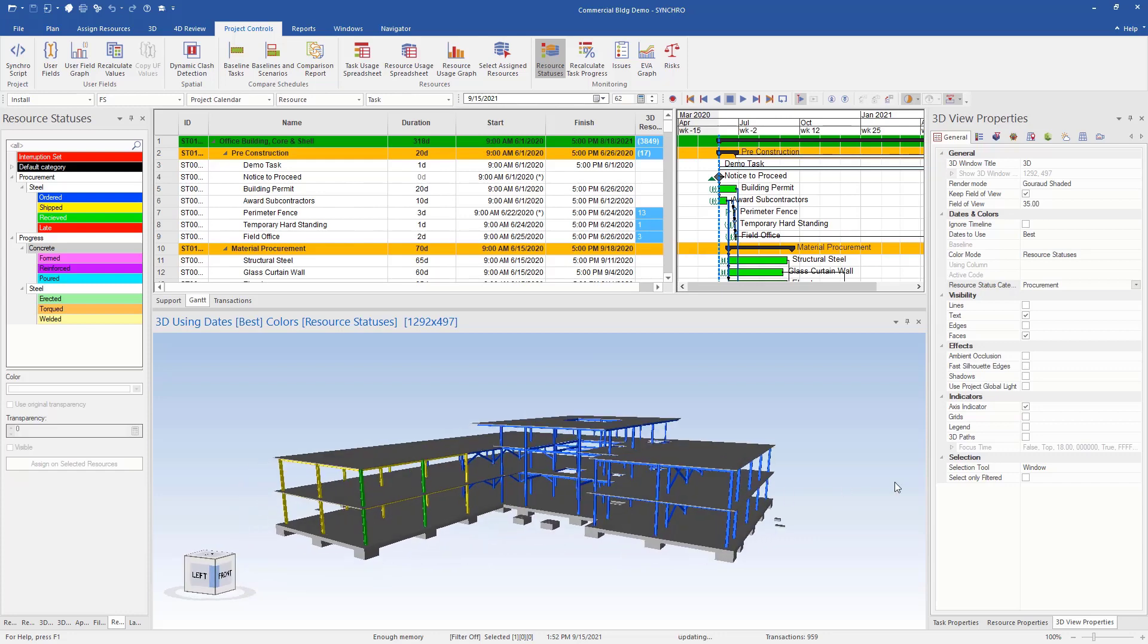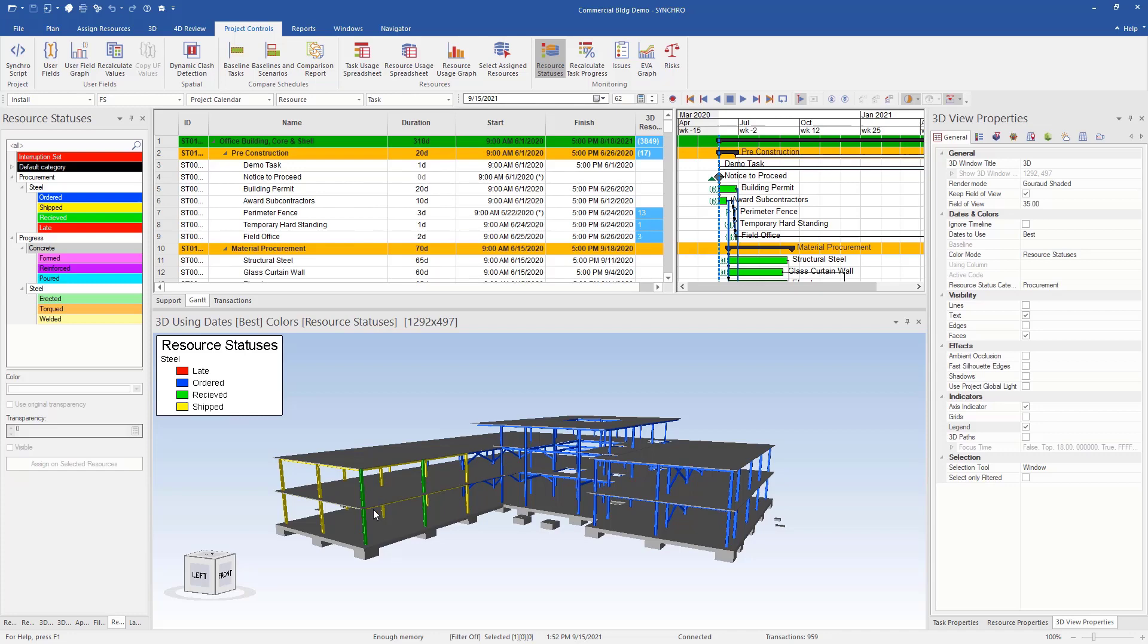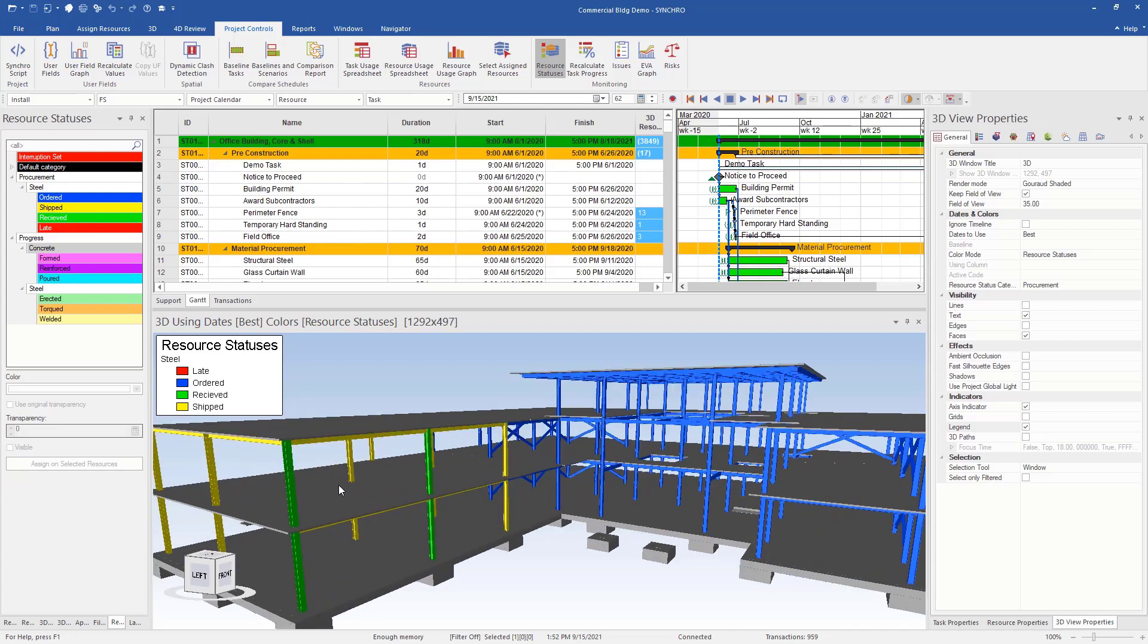So now you can see with the procurement, I can see, and we'll turn on our legend here, so I can see that I have a bunch that has been shipped. It looks like everything has been ordered and then I have two that have been received.